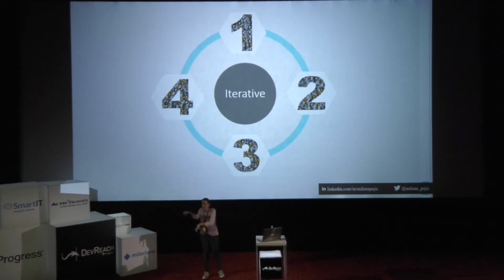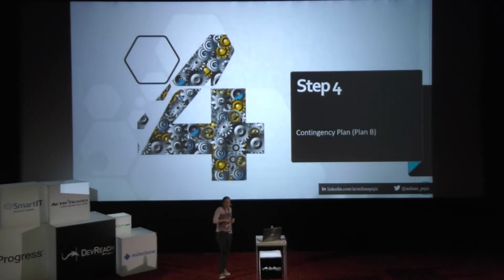So to summarize these 3 steps, we created the risk registry by identifying our risks. Then we evaluated the risks by using the probability and impact matrix. And now we came up with a set of actions to mitigate the risks. The last step that is still left for us to do is contingency planning. Again, another English word that doesn't make too much sense to me. But if you say plan B, I tend to use plan B because it makes more sense to me. So it makes us think, what will happen if our mitigation plan fails? We plan how to reduce the risk, but it fails.